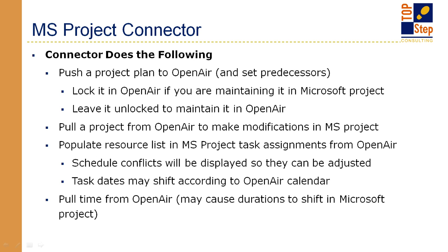So what the connector does is it allows you to push a project plan to OpenAir. You can set predecessors from Microsoft Project and push it into OpenAir. If you're going to maintain it in Microsoft Project, you can lock it in OpenAir so that you can't update any of the tasks. You can't do anything, but it is there for you to view. If you're going to manage it in OpenAir, you can leave it unlocked.